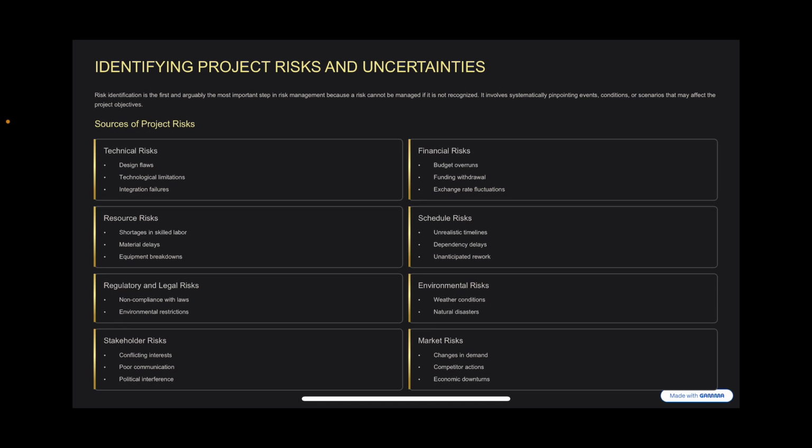If I told you you're shorting 200 naira per dollar, it would have seemed small, but cumulatively, you've lost a significant amount of money, and it's a risk. It might not even be enough to cover the costs before you're even contemplating your overhead and profit. So exchange rate fluctuation is a considerable risk you should take into account when doing an international project.